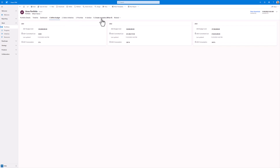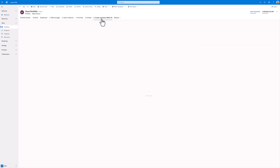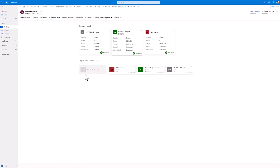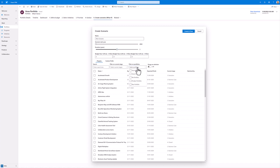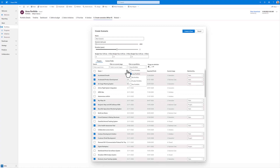So now it's time to create a scenario within What If. I click here to create my scenario. When creating a scenario I give it a name. Then I define when it starts and the duration of the scenario. I can select all of the connected initiatives by filtering here. So for my Grow portfolio, the 17 initiatives in the portfolio are auto-selected.